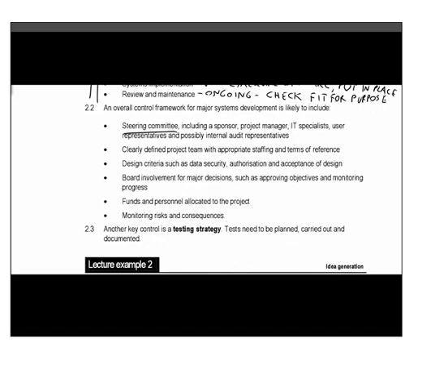Now, there are certain controls that need to operate at a macro level. Remember, in this paper, what we're mostly interested in are the risks involved in this process and what controls you'd expect to see in place. Now, a big project like this, you would expect to see some overall controls, such as having a steering committee in place. It needs to be taken seriously. This is probably something that's very important for the business and involving a lot of money.